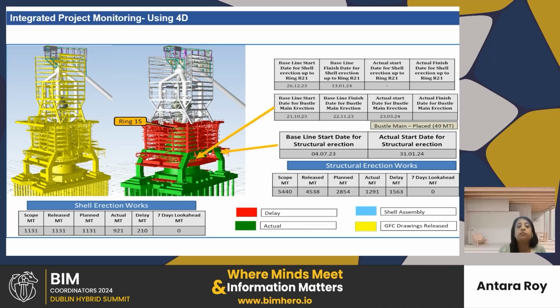And for the customer, we provide a one-month look-ahead plan in a monthly report. This really helped our project and engineering people, because everything is collated, subcontractors also. All are collated in a single platform and everyone is on the same page to visualize my project: how much I need to do and what I have already completed.